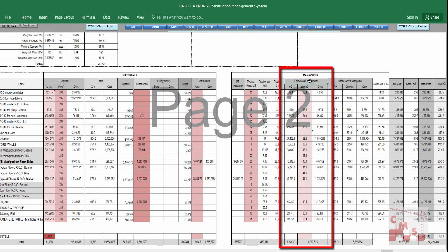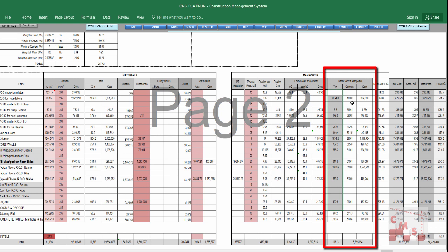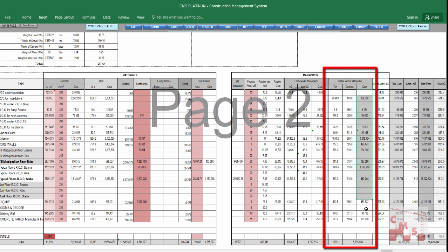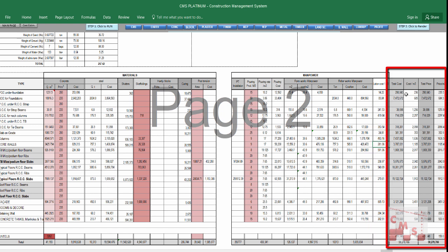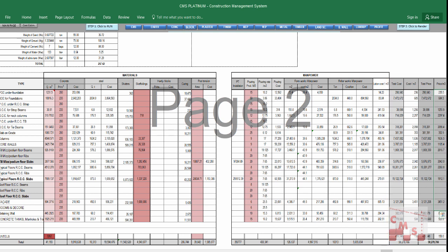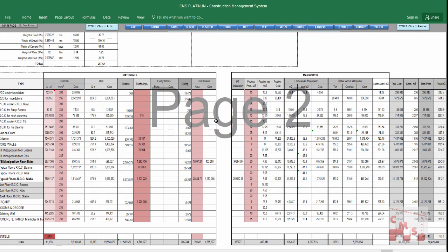CMS gives the total labor cost per cubic meter for reference, total cost for all concrete work, cost per cubic meter, and the price to be presented in the BOQ per cubic meter. Currently profit ratio is still 1 (not set), so cost equals price — this will change once profit is added.